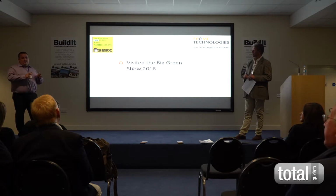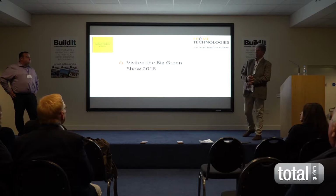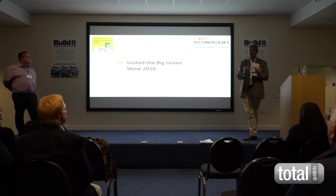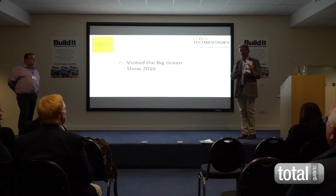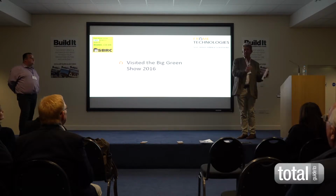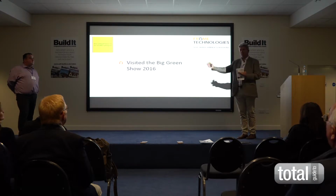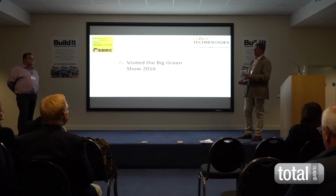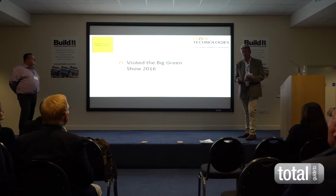If one lot of people are dealing with it, then there's not going to be any sort of conflict in what's going on, and also it keeps the cost down as well. Obviously as we started going through the drawings, there were certain things we had to do with layouts, but also it's time. Turnkey actually speeds that process up, because we could run the timber frame design parallel with doing the building reg submission. So as soon as we got building regs submitted, we were approved on the timber frame drawings and up and running. And it also gave you cost certainty, which from a budget point of view is key.